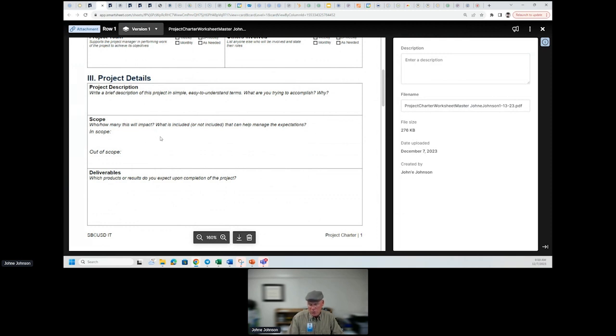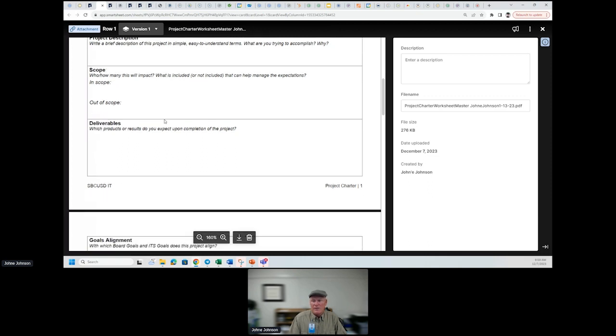So we're going to have these 12 people. They're going to work in this one room. Out of scope is we're not going to be doing tech support on any of their devices. I want them to know that up front. You're coming in from another outside agency. You've got devices. If you have issues and it has nothing to do with just connecting to my network, that's going to be on your tech support, and you guys need to realize that and be aware of it.